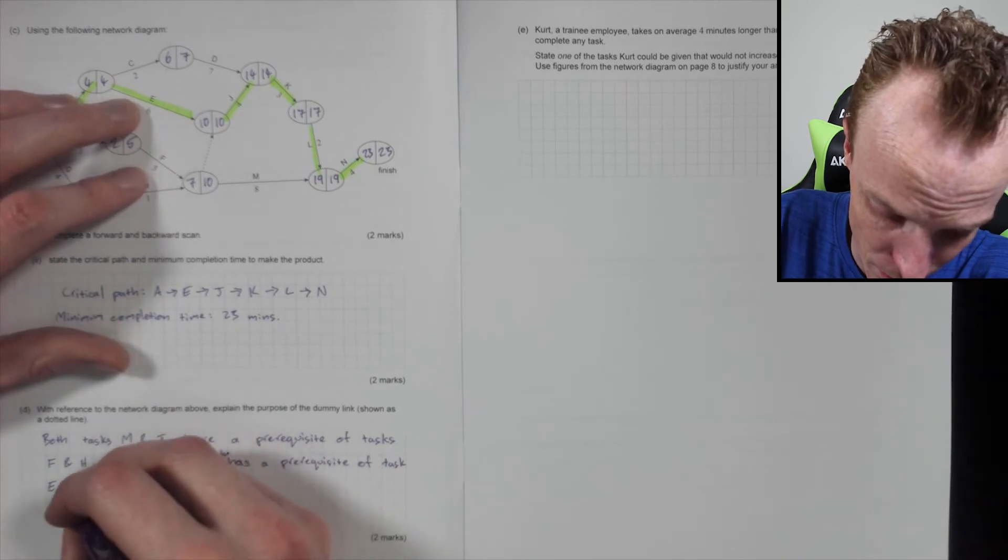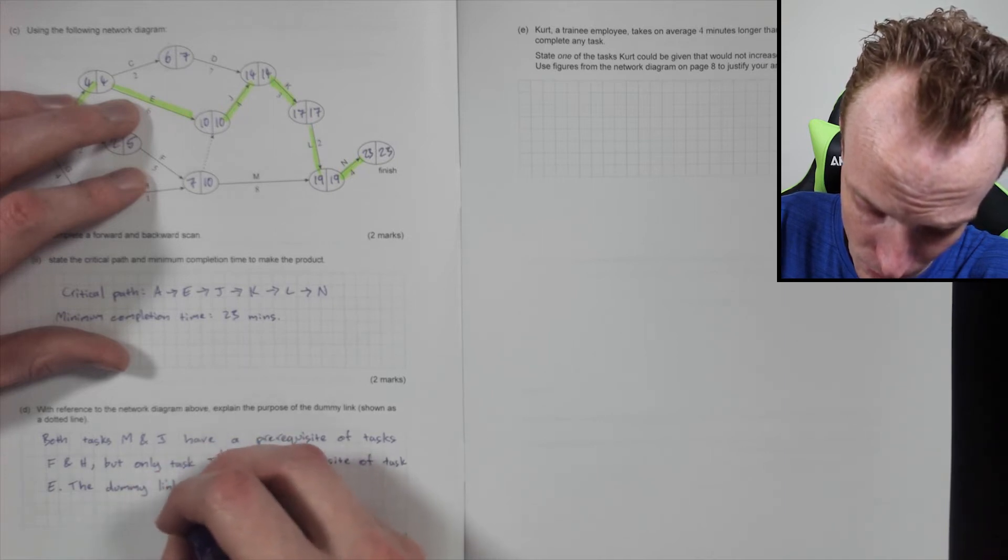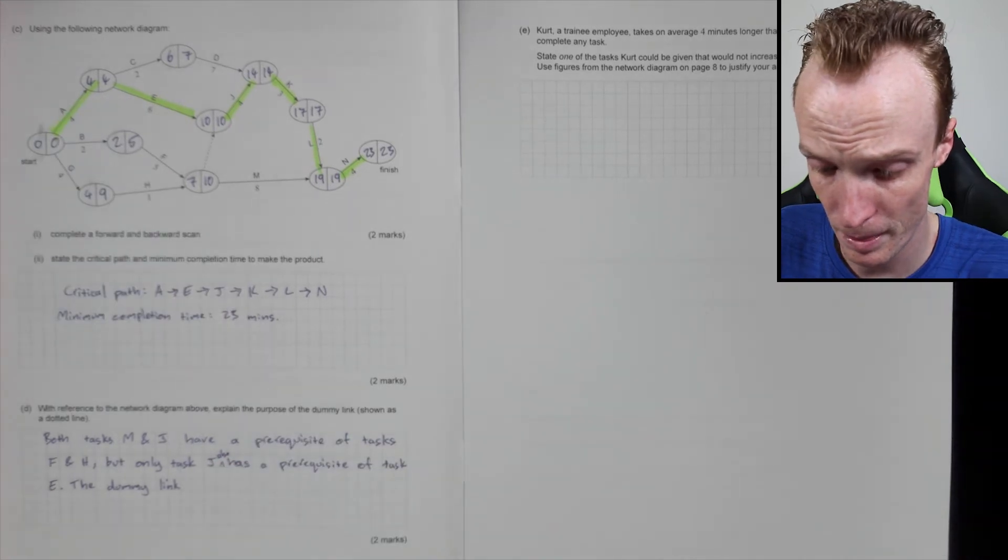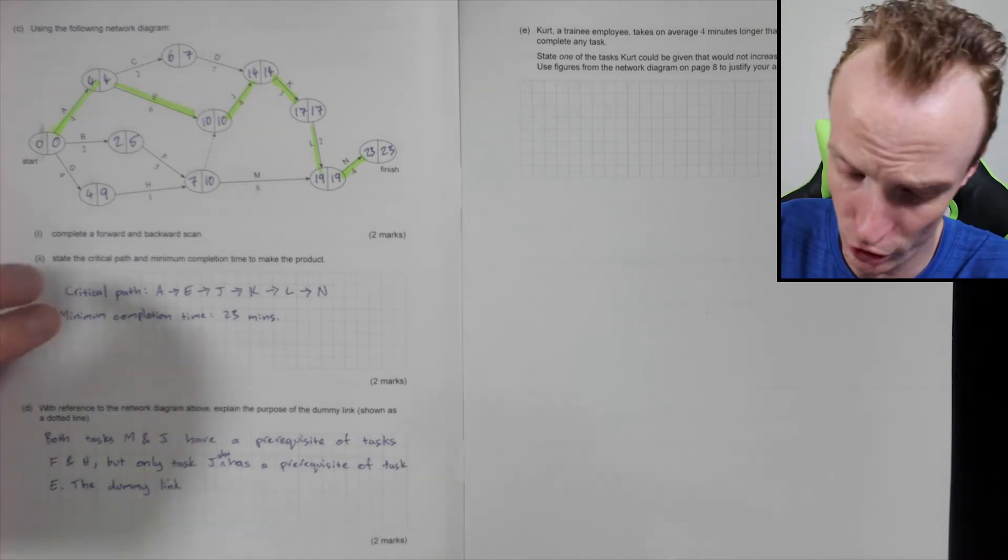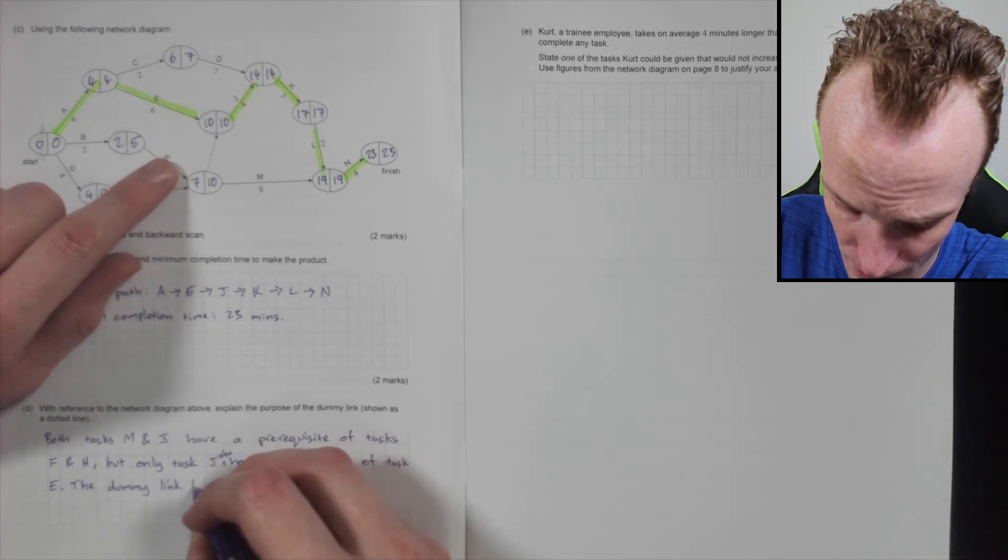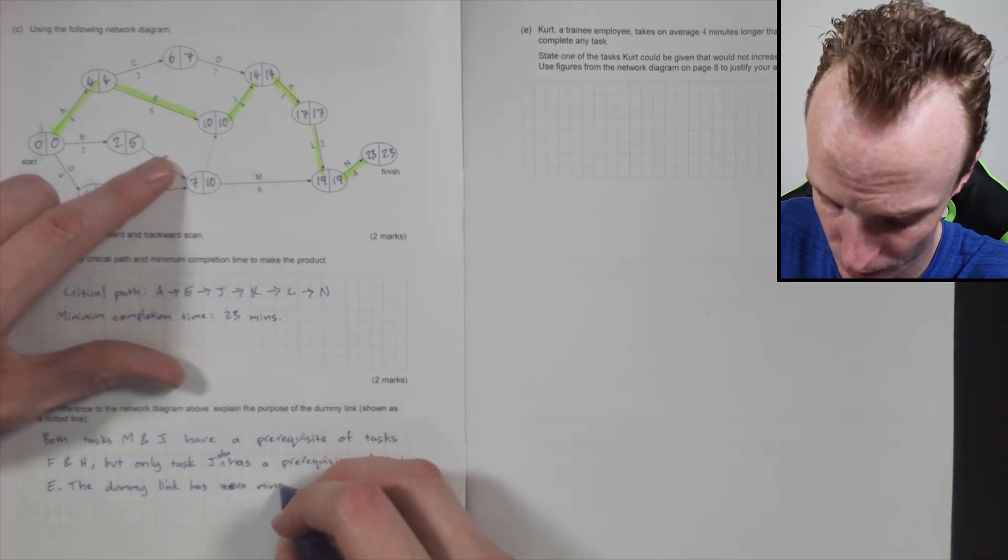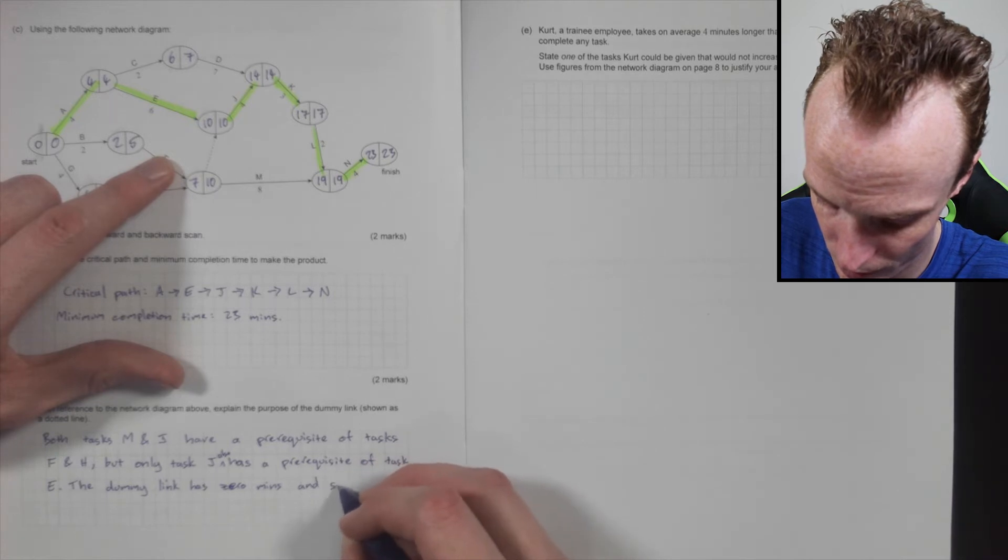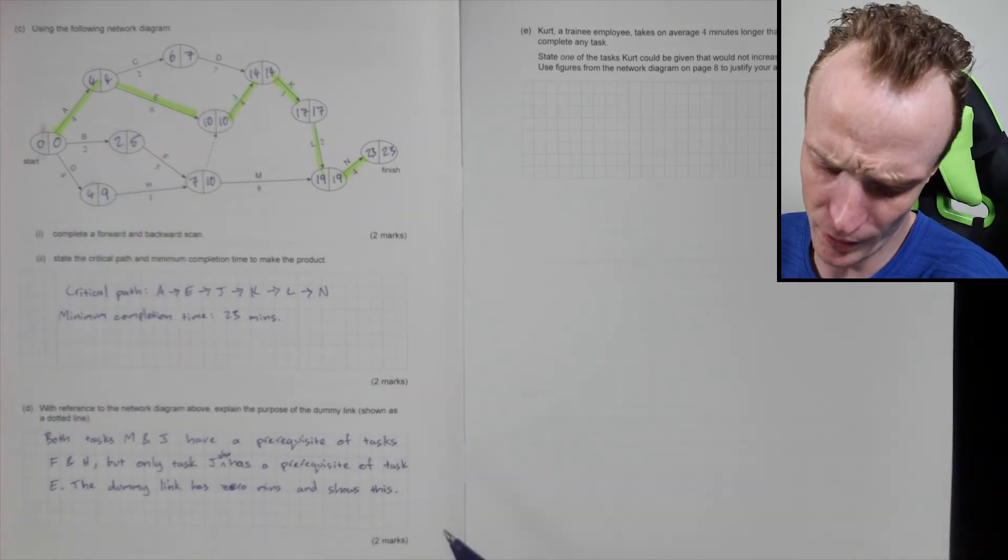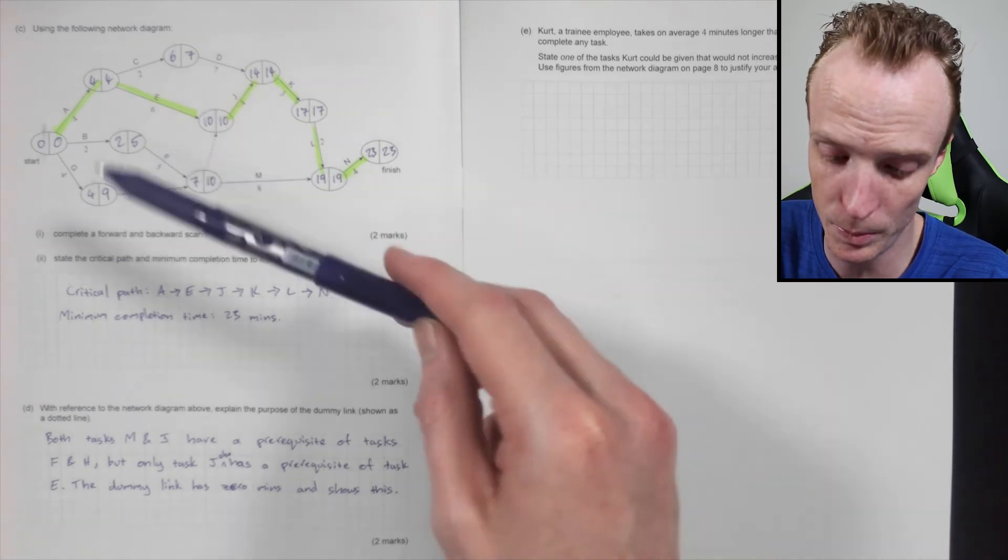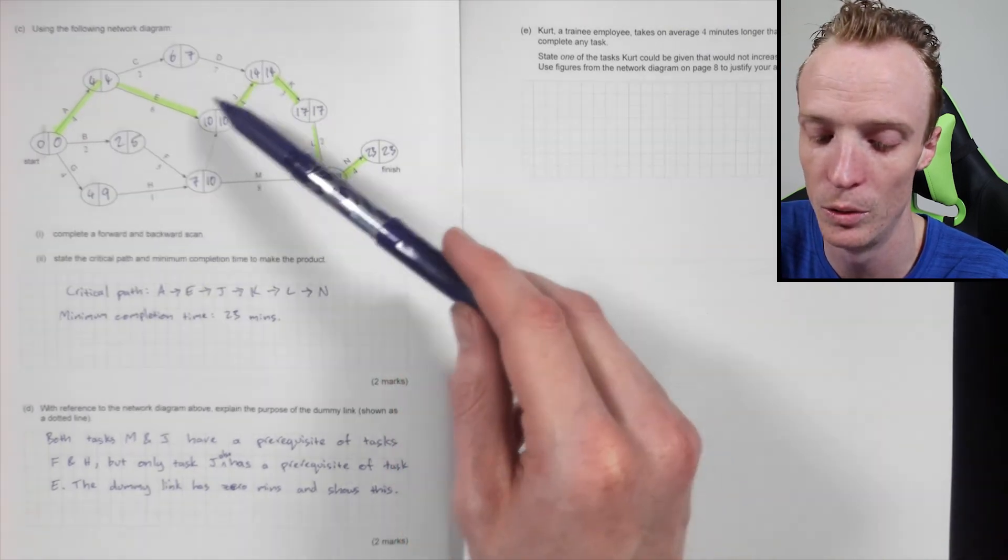The dummy link, how would I say this, the dummy link has zero minutes and shows this. I might just say shows this—basically, two marks that I can see would be for identifying very specifically that both of them do have that prerequisite of these two, but task M can be started with only those two completed, where task J also needs task E completed. That's really where the marks are coming from.